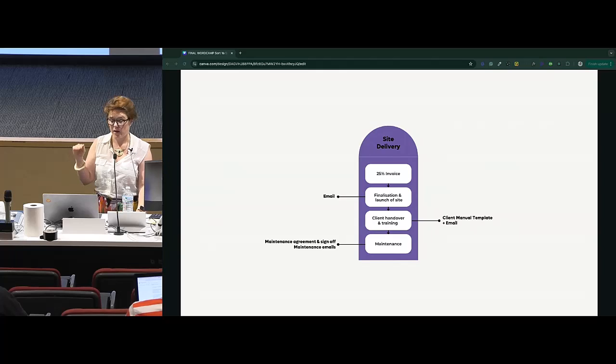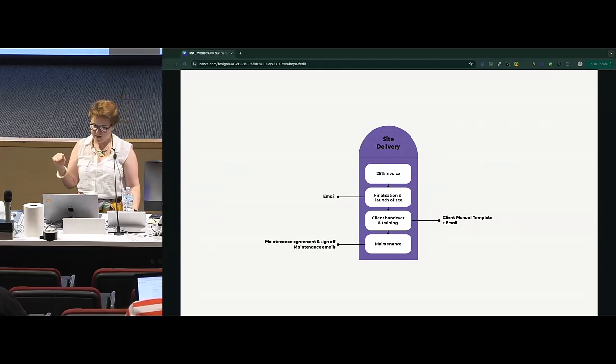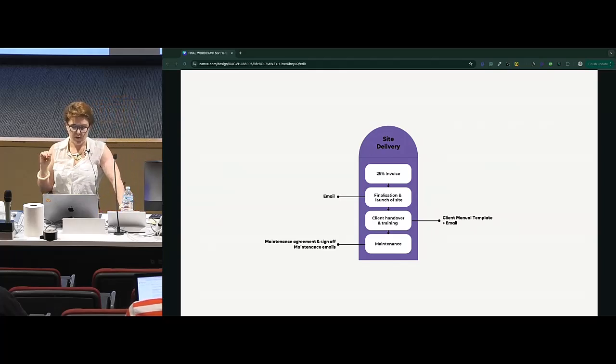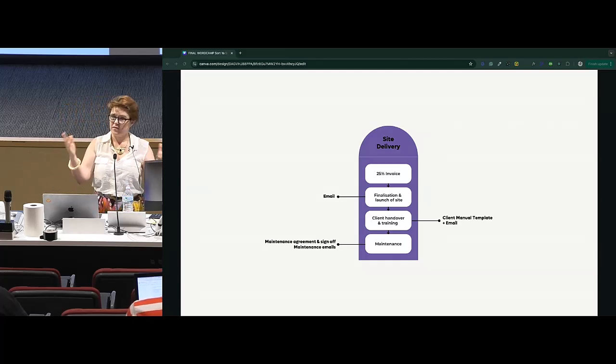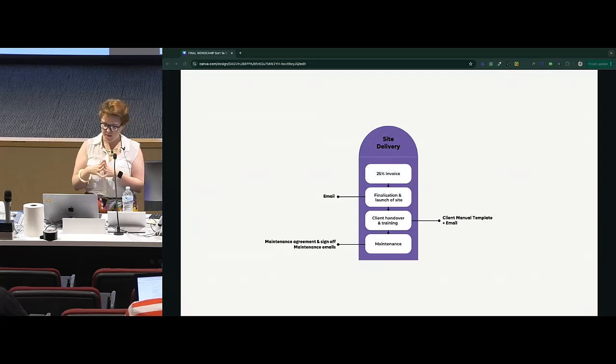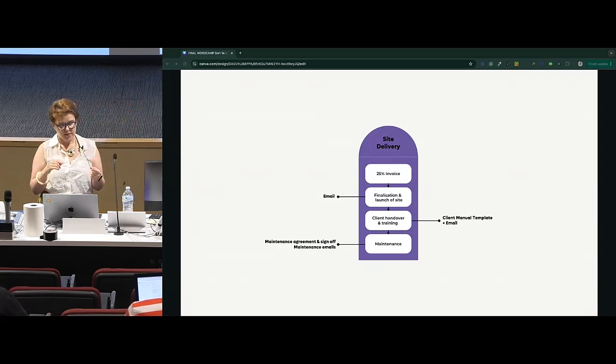So first up, before I launch the site, a 25% invoice. Then we go through the finalisation and launch of the site. There's an email template to tell the client, hey, your site is live. This is what you can expect next. And then I deliver their client handover and training documents.